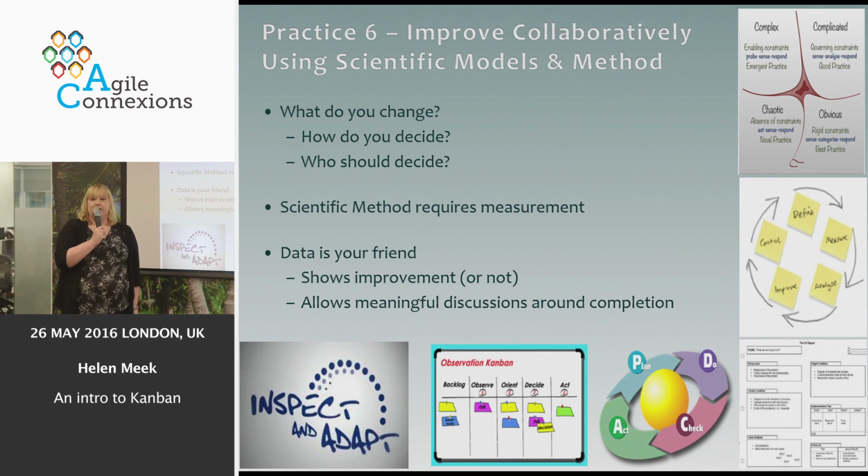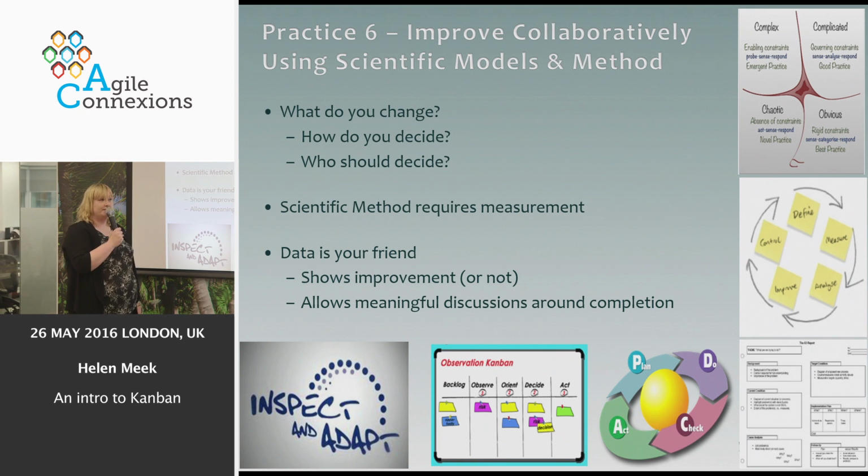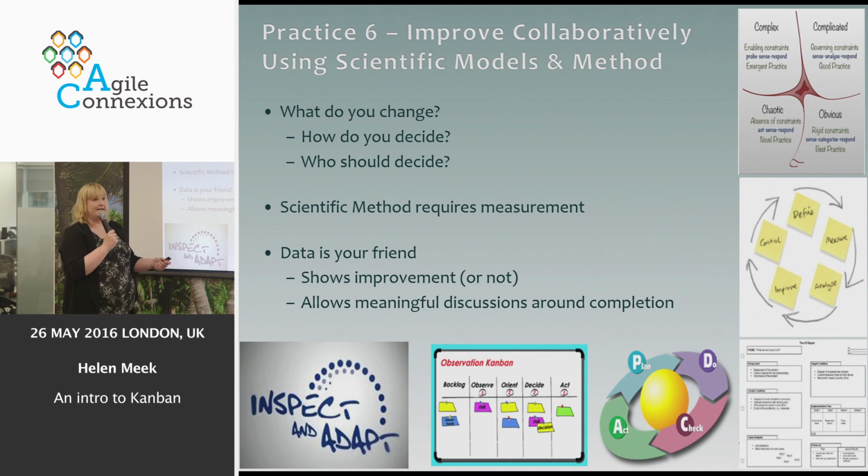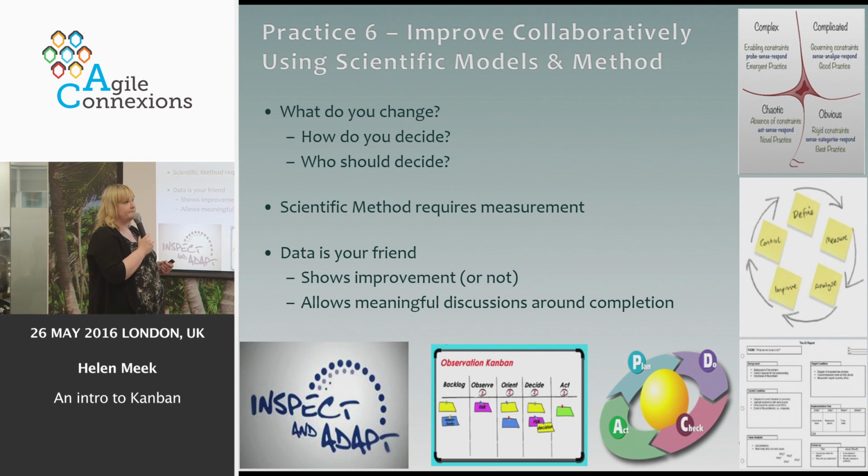Another tip is don't make too many changes at once, because if something succeeds and something fails, you don't know which one it is. So focus your improvements in targeted areas. Look for the biggest problem that you've got, tackle that first, see what the outcome of that change is, and then make a decision about what the next thing is that you're going to tackle. Because the second thing may not be the second thing after you've solved the first problem. Always look for the biggest thing and solve it.